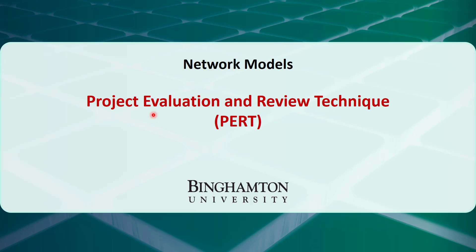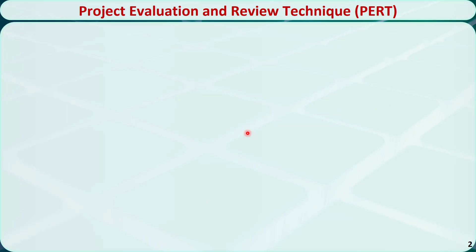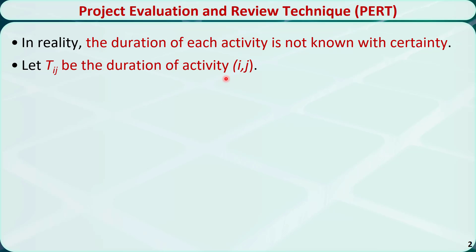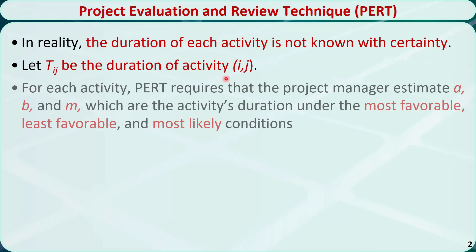In this video, I will talk about the project evaluation and review technique, or PERT. We have seen several project network examples so far. In those examples, we assume that the duration of each activity is known precisely. In reality, the duration of each activity cannot be estimated with 100% accuracy. So the duration of each activity ij can be modeled as a random variable tij. Then we can use PERT to estimate the duration of each activity and the duration of the critical path.